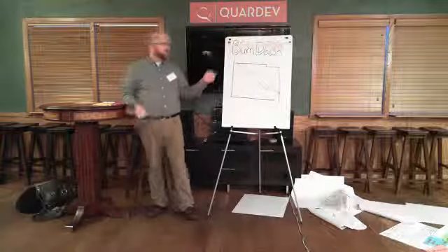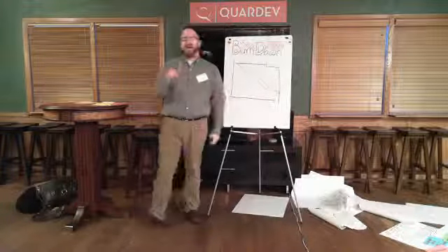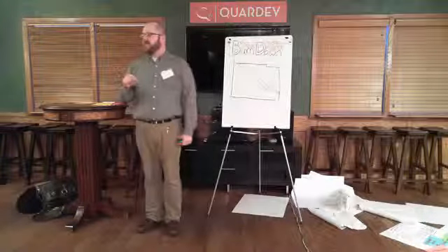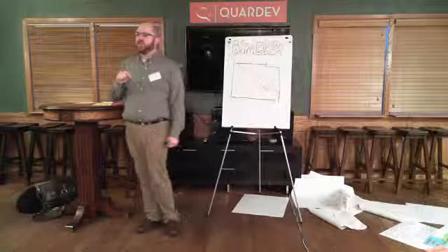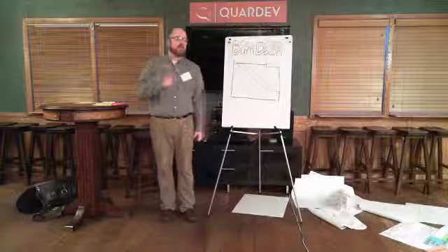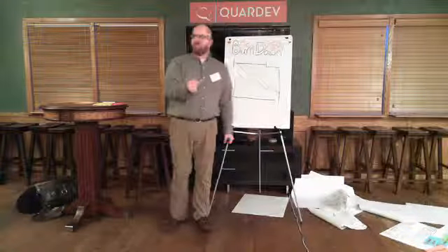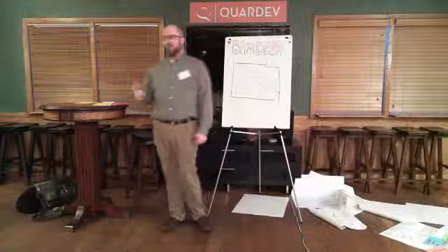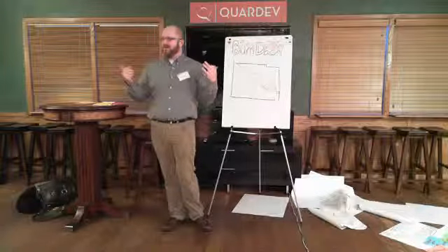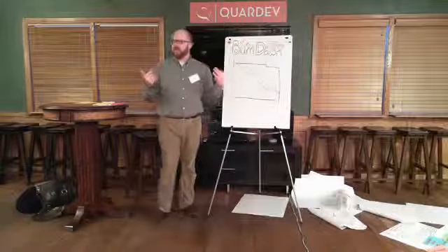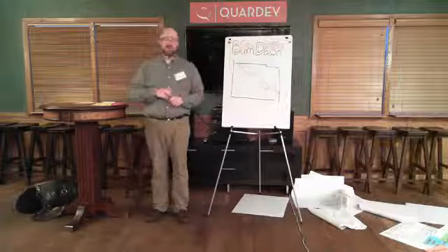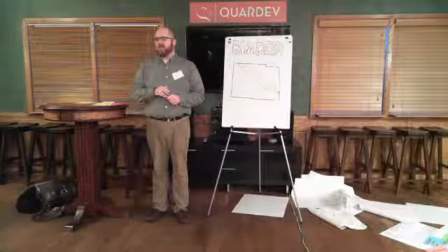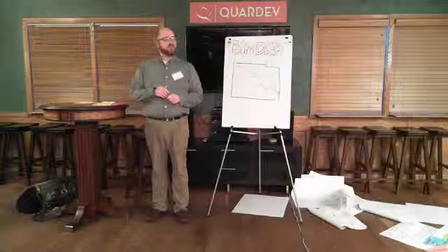And some of the knobs that you turn on this process is just how granular do we get with the tests. And I think days is a pretty reasonable one to start with. Can we get something that is testable every day or two during the sprint? That keeps you from having a million tasks and a million tests that you can't keep in your mind, but something that people are able to summarize. And it also helps with that conversation about just how long is this planning session going to be?